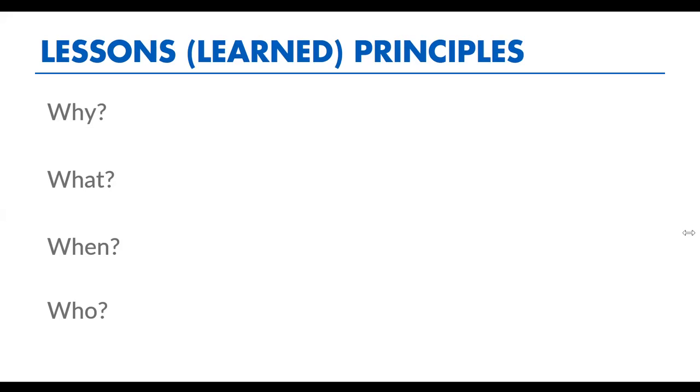And do we have time for 2 more comments? Yeah. So from Shahida, we have to inform future programming and to share experiences with broader humanitarian actors and sectors for replication and scale up, absolutely. And it contributes to science, policy, and practice. We also have Ian, who has said the majority of lessons within the START Fund are captured and discussed within 2 to 3 weeks after project completion. But we've at times considered gathering lessons during project implementation, and also checking in several months later to see which lessons and recommendations led to improvements. Curious if anyone has thoughts on cost benefits of this.